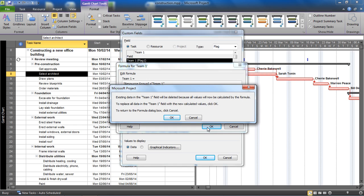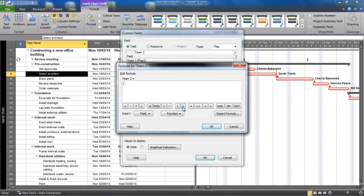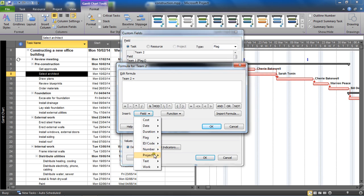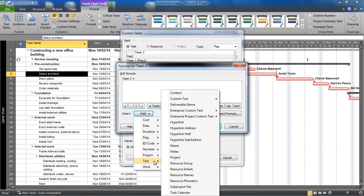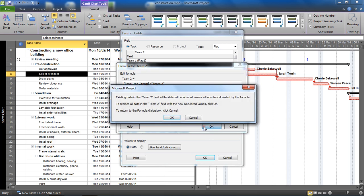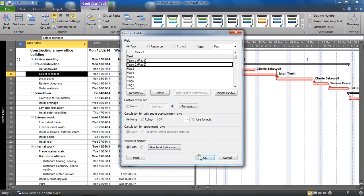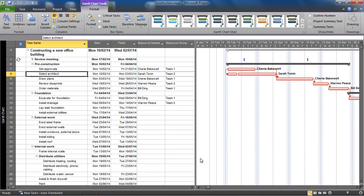I'll click OK. I'll get a message saying any existing data might be lost, you're now using a formula to calculate the answer, so yeah I know I wrote it, I'll click OK. I'll select flag two, formula, let's get resource group in there. It's probably quicker to select it and type it. Does resource group equal team two? Click OK, OK to the warning and OK to save and close the custom fields dialog box.